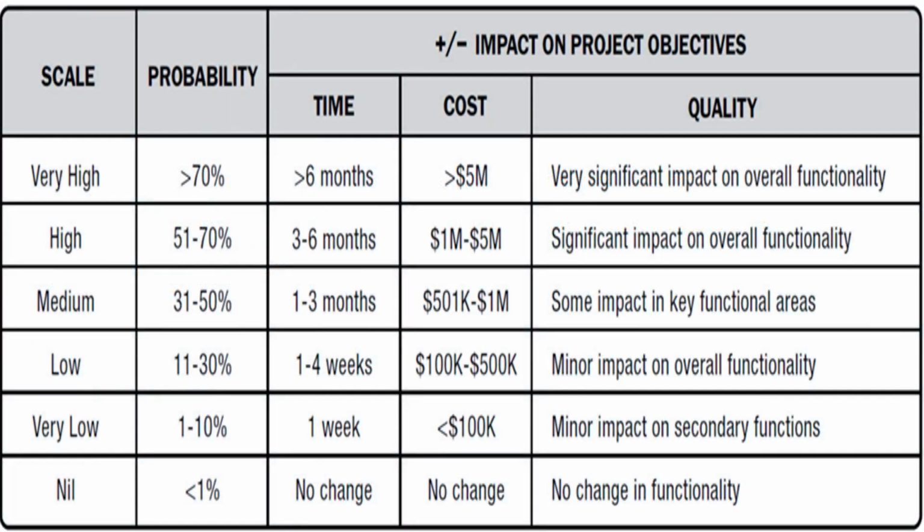Definitions of risk probability and impact levels are specific to the project context and reflect the risk appetite and thresholds of the organization and key stakeholders. The project may generate specific definitions of probability and impact levels, or it may start with general definitions provided by the organization. The number of levels reflects the degree of detail required for the project risk management process, with more levels used for a more detailed risk approach, typically 5 levels, and fewer for a simple process, usually 3.